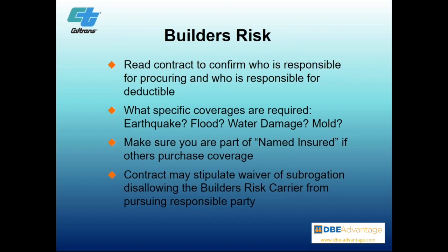Sometimes during complaints or claims against builder's insurance, it can get muddy, should I say, and everybody has their opinion. You want to make sure that you're named as one of the insured so that you can give your input and defend your position. That's one of the tips we'll give you here. That's very important. Don't just sign it over to the owner of the project for that payment to be made. You do want to be in that link.